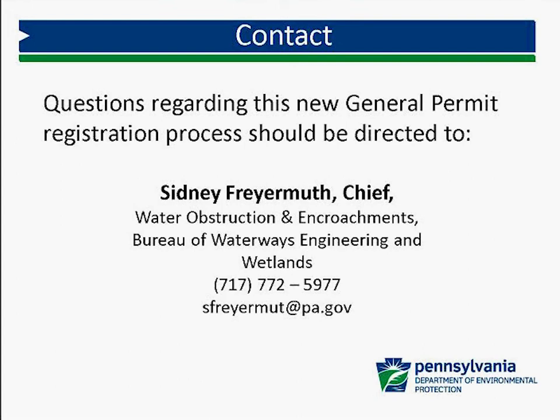First question is, do you still need a bog turtle clearance? A bog turtle is a federal threatened and endangered species, which you need to have a clearance from U.S. Fish and Wildlife for any potential impacts. So yes, it's still required. The bog turtle form, phase 1 form that the department previously had, is no longer required.